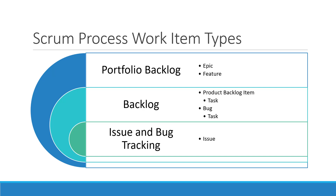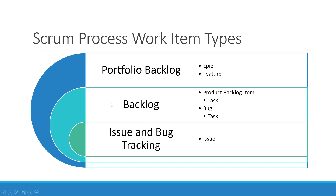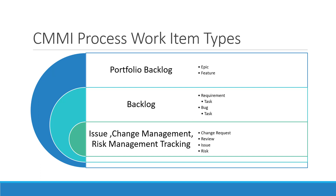Now let's see the Scrum process work item types. The Agile and Scrum process templates are similar — there are only a few terminology changes. In Scrum it is called a Product Backlog Item, while in the Agile process it is called a User Story. That's the only difference between the Scrum and Agile process work item templates.